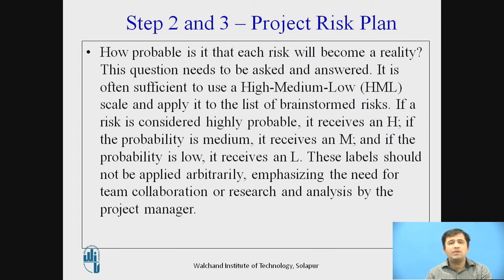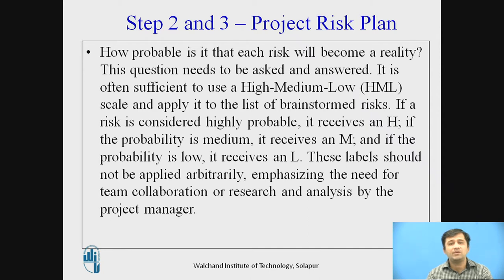How probable is each risk, and how probable is it that it will come into reality? This question needs to be asked and answered. It is often sufficient to use a high, medium, low scale to apply to the list of brainstormed risks.